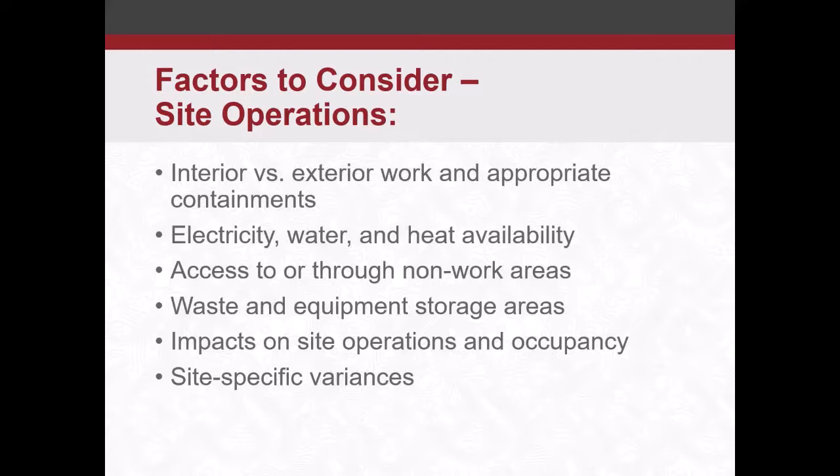Access to or through non-work areas. You might be doing abatement or remediation in certain areas, but still have to gain access through areas where they're not doing work. So you time the work so they come in early, or use shift work, things like that, so they're not impeding operations. Those are the sorts of things you want to describe in that design.